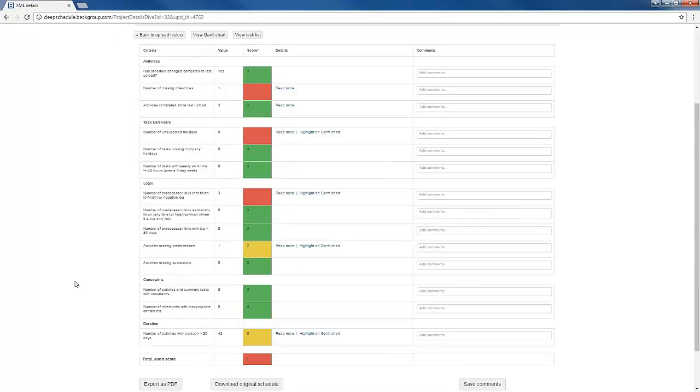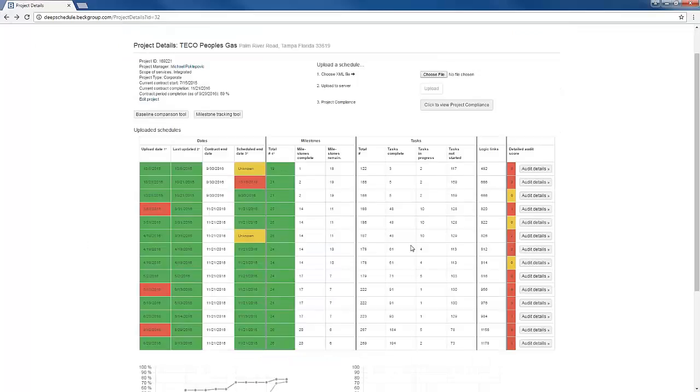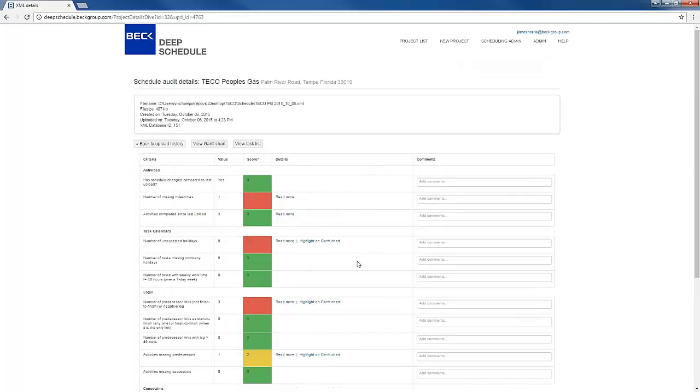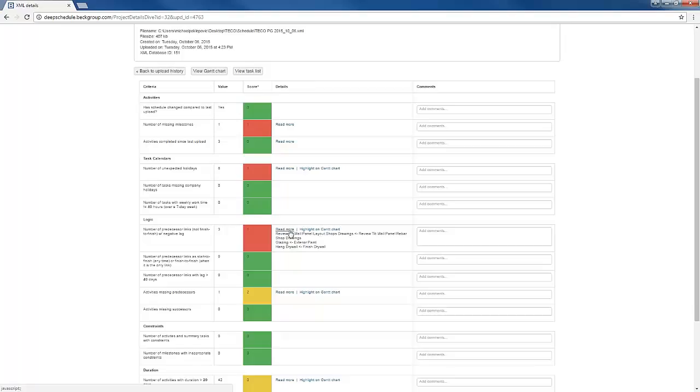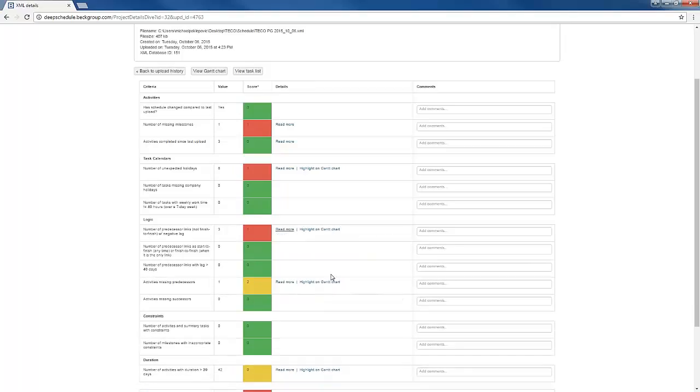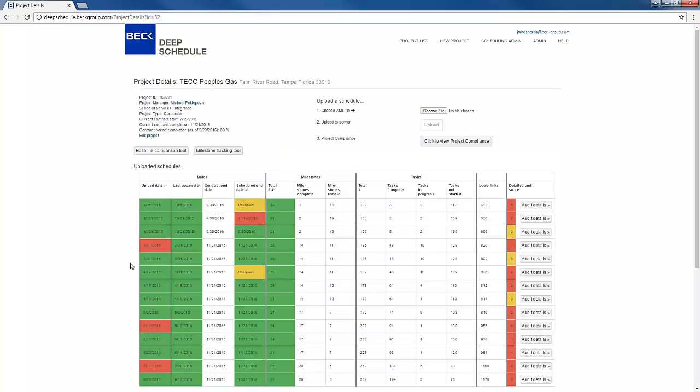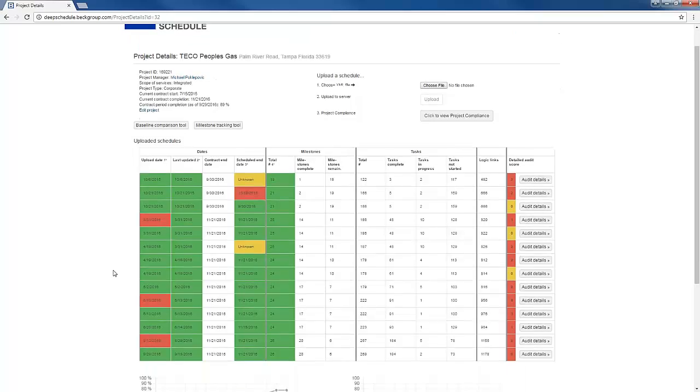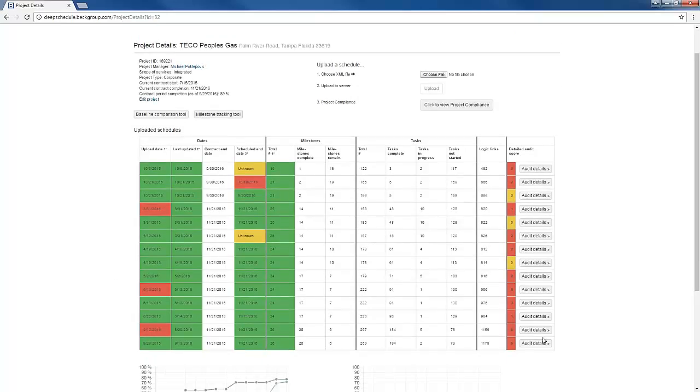and passively, all of our teams, everybody gets to see how their schedule is really tracking, what the details are, like how many predecessors have negative lag. We have a scheduling policy at Beck, but the problem with written policies is nobody reads them. Nobody reads policies, and you shouldn't pretend that if you write one and implement it, everybody's going to follow it, because it's just not the case. So how can you passively keep people following your policies? We built this dashboard and have those policies built into the dashboard.